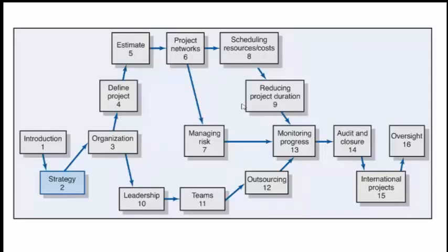And closure is basically whether they look at all the deliverables, whether you have delivered as per the customer requirements, whether you have done as per the quality management, whether you have done all the documentation as per CMMI or ISO or any other certifications, or even BS 7799, your security certification, whether you have ensured all IS security norms, policies and procedures are followed. All those things are checked in the audit and closure.